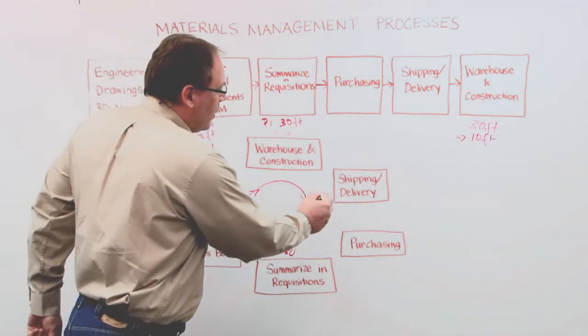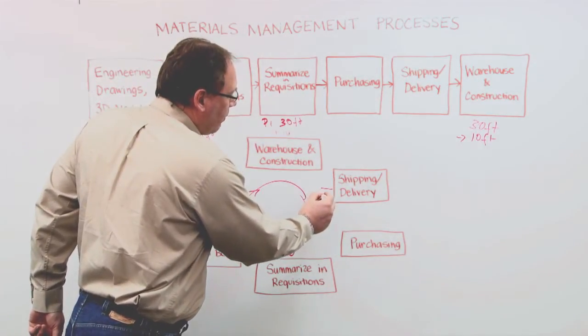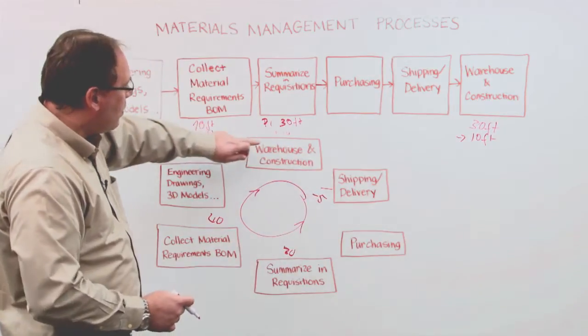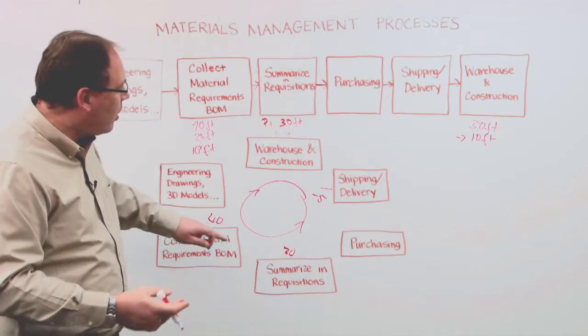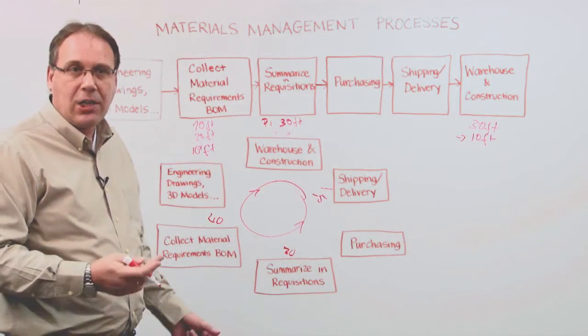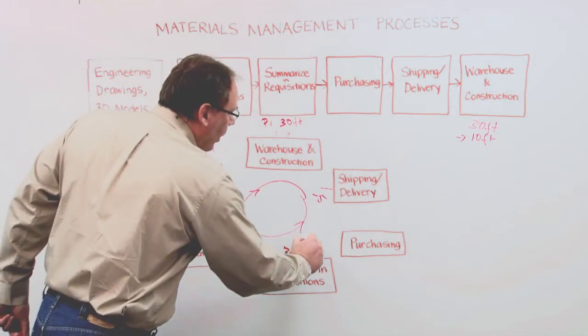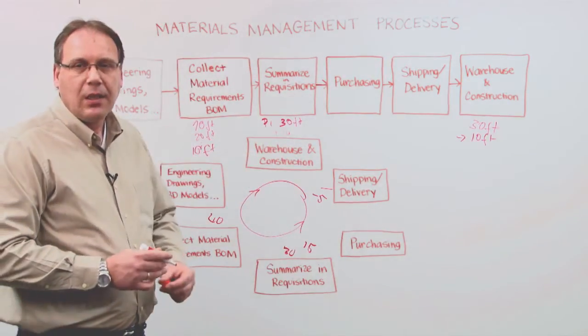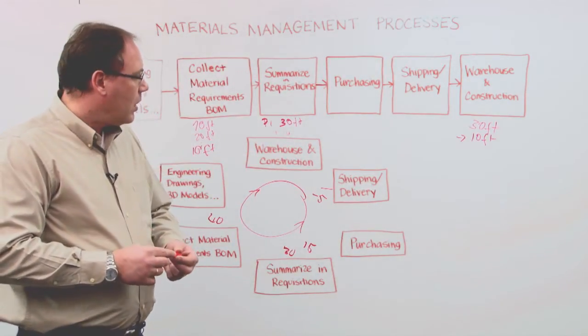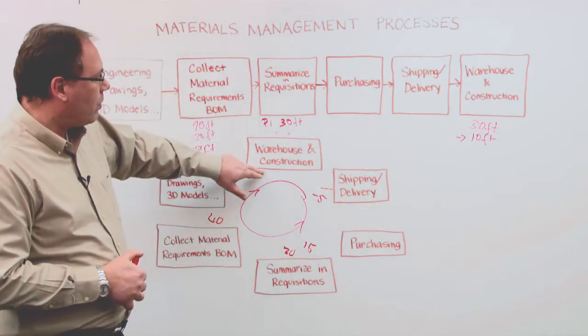When something was damaged in delivery, perhaps minus 5, then suddenly the system knows it's not just 10 more I need in the model, it's also now 5 because it was damaged. So actually I need 15 more, right? Make sure I have always enough materials in the warehouse for construction.